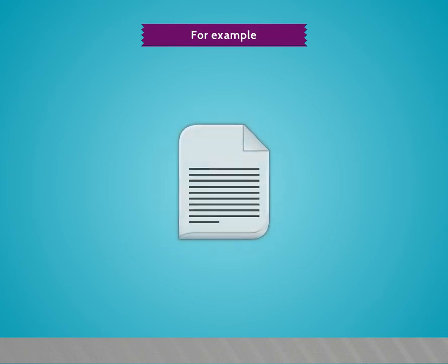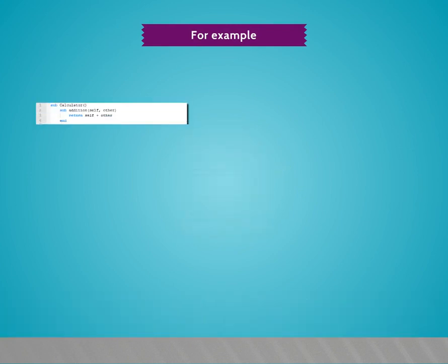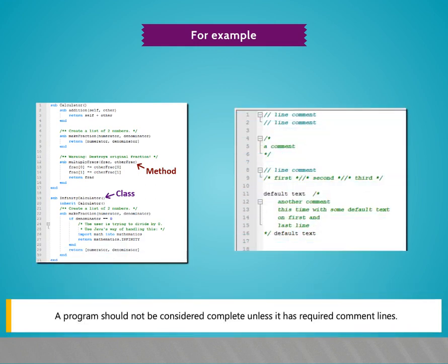For example, a phase should not be considered complete unless the documentation is complete. A program should not be considered complete unless it has required command lines.